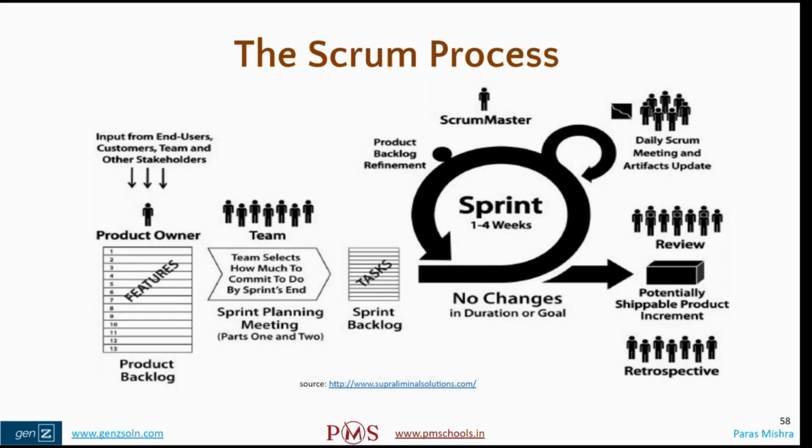Okay. Now, what is the outcome of that meeting? A sprint backlog. You know exactly what you need to deliver in a sprint. This is sprint. Is there a question on this? Did you understand? You look at the product backlog, you pick the stories from there, book the scope from there, and you decide the sprint backlog. What is the sprint? 1 to 4 week time box period. That is your sprint. Who picks the stories? Who picks the scope? Who decides the sprint backlog? Scrum team. What is the Scrum team? Scrum master, product owner, and development team.